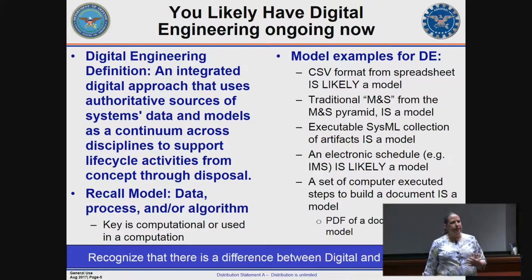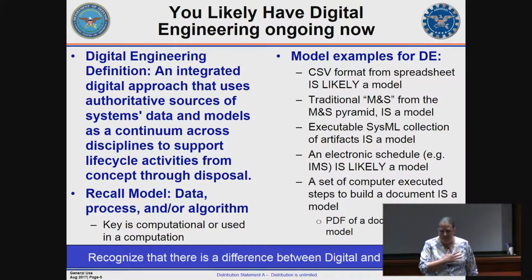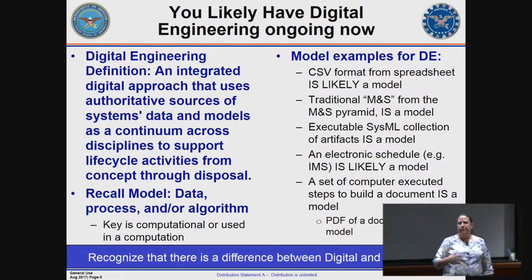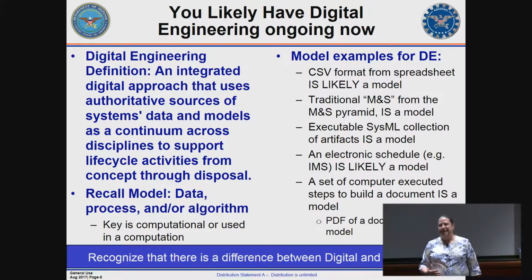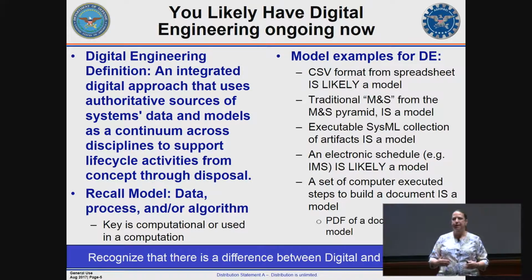That's another good one. Integrated master schedules are what we work with in the Department of Defense. What happens is that they're kept in a computer. They often track packages. They often are related to the way we track earned value in our system. But when I have to check, I take a snapshot of the schedule and I put it in a document. A couple weeks later, somebody else has to check in a different discipline, and they take a snapshot of the schedule that has advanced in time, and they put it in a document, and lo and behold, now we have two different schedules describing the same program. That's really not true, but that's the way it presents when you remove it from an executable format.